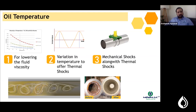Along with temperature variation, mechanical shocks are also required to loosen debris, and for that purpose pipeline vibrators are used during the flushing activity.